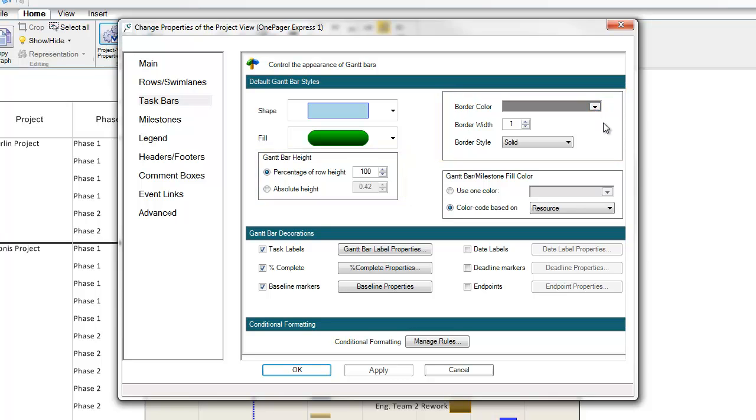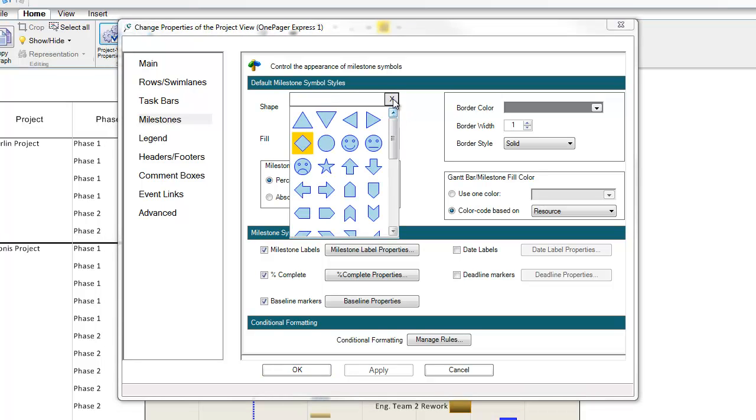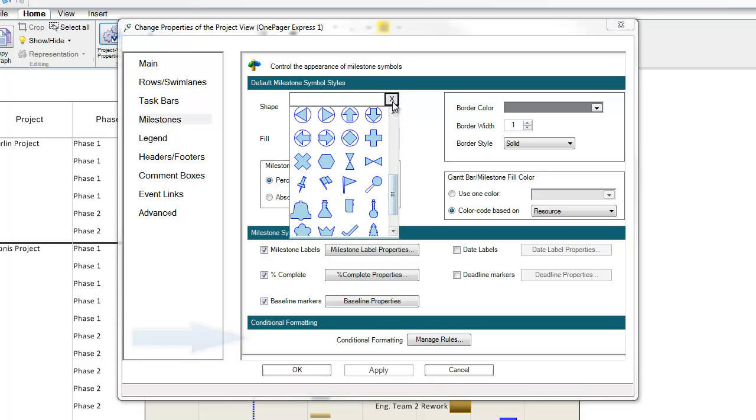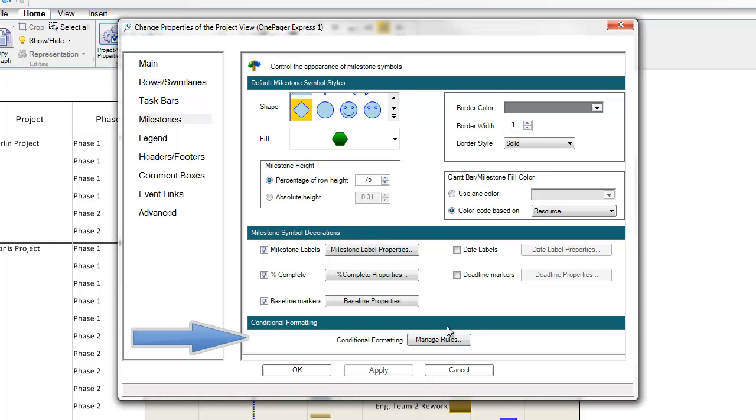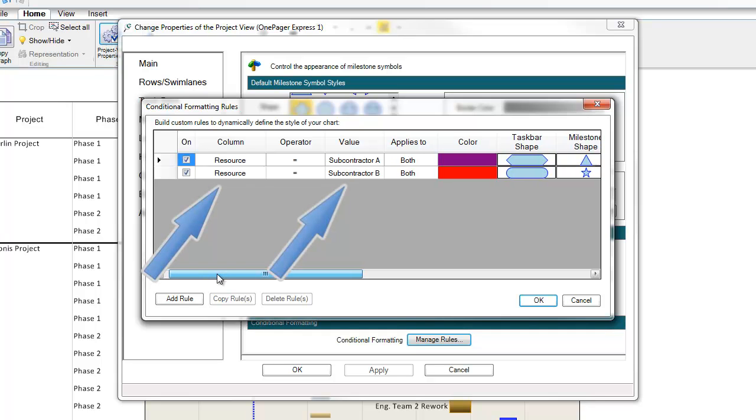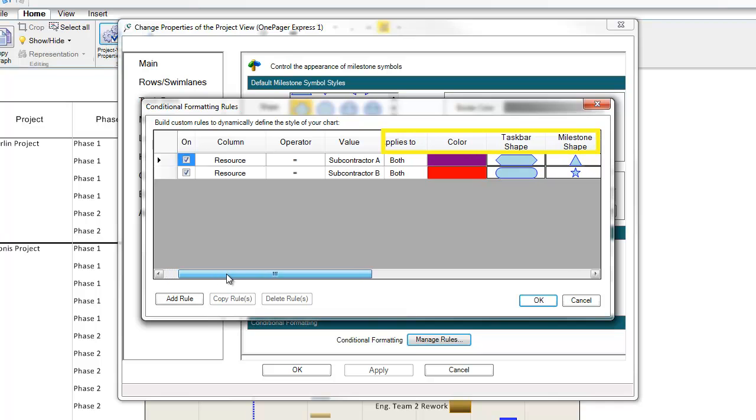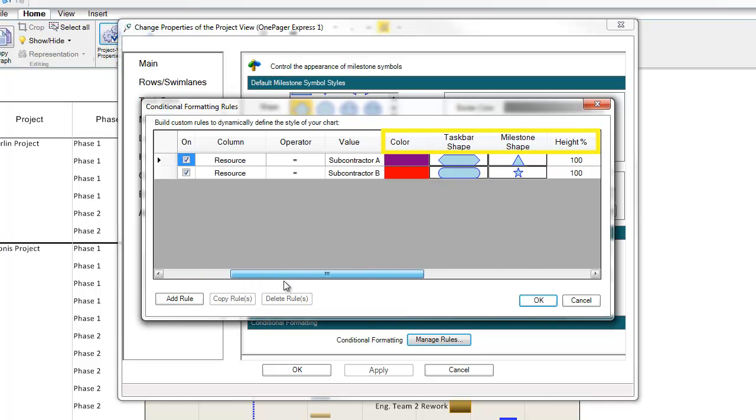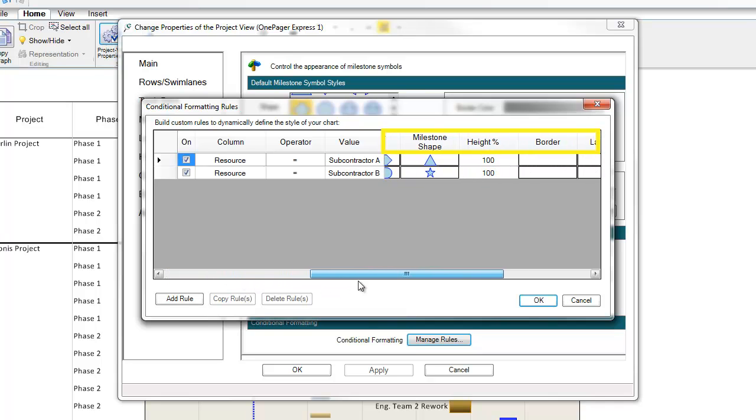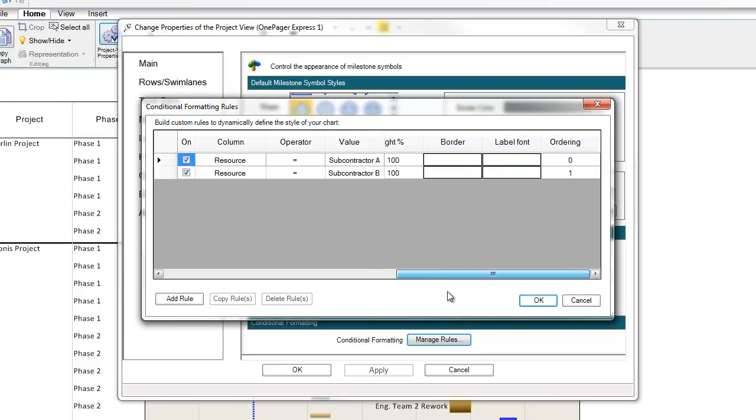In my milestones tab, you'll notice that I have about 50 shapes to choose from. At the bottom of the task bars or milestones tabs, you'll notice a section called Conditional Formatting and a button that says Manage Rules. If I click that, you'll see that I actually set up my template so that if OnePager sees specific text values in my resource column, it will format my shapes a certain way. Color, shape, size, font, and border formatting are all something that you can have OnePager control based on specific data in your source document.